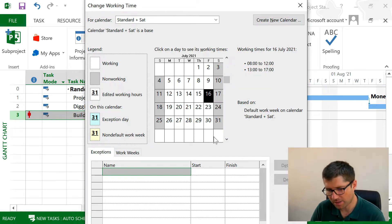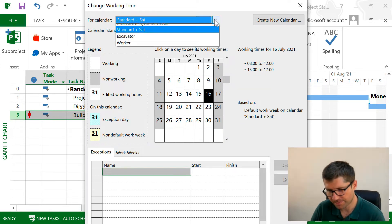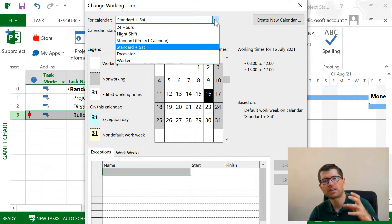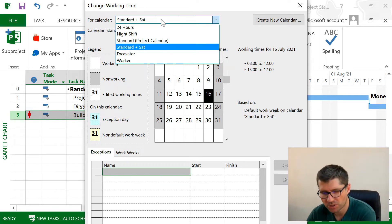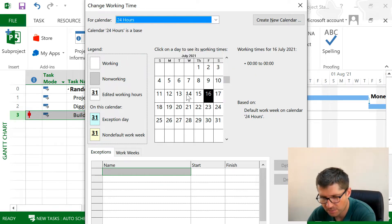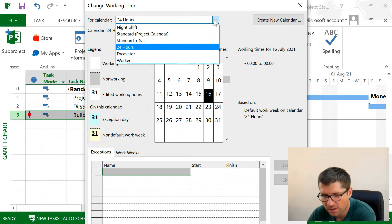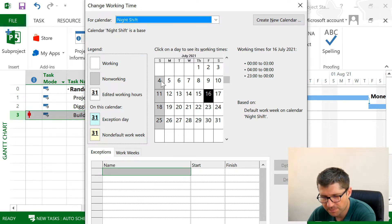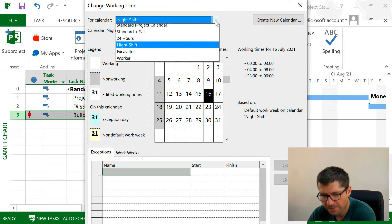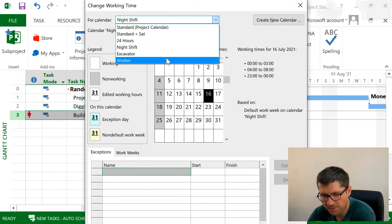By the way, we have three default calendars in Project: 24 Hours, in which I'm working around the clock; Night Shift, in which I think only Saturdays or Sundays are off; and also this Standard one.